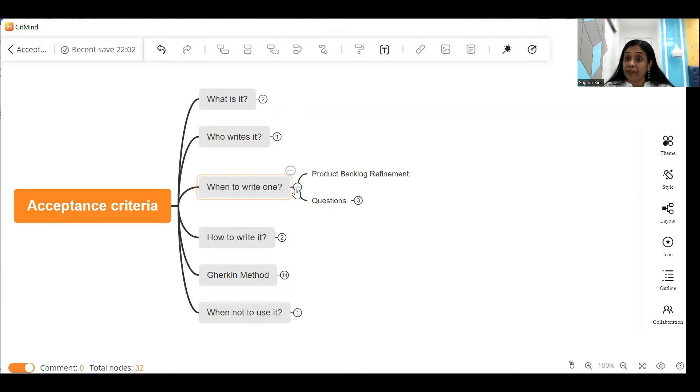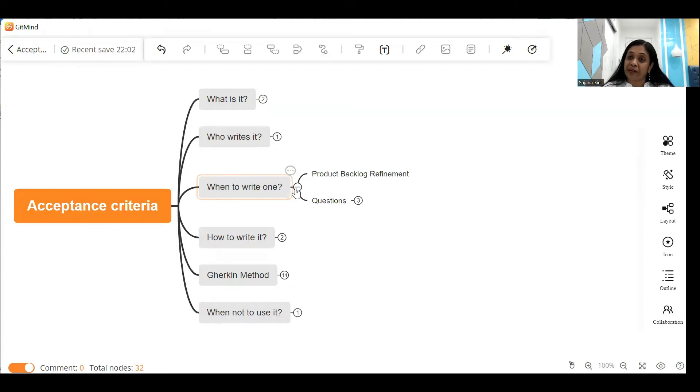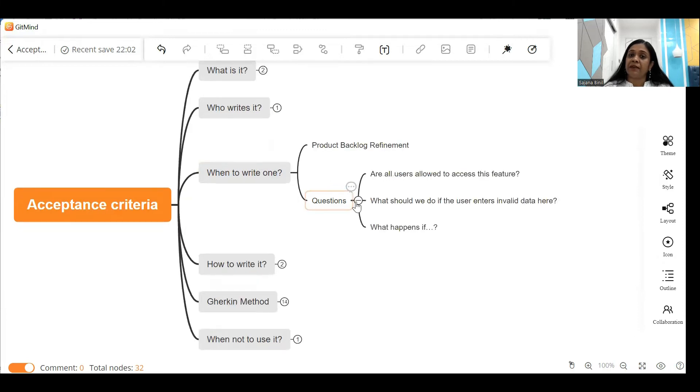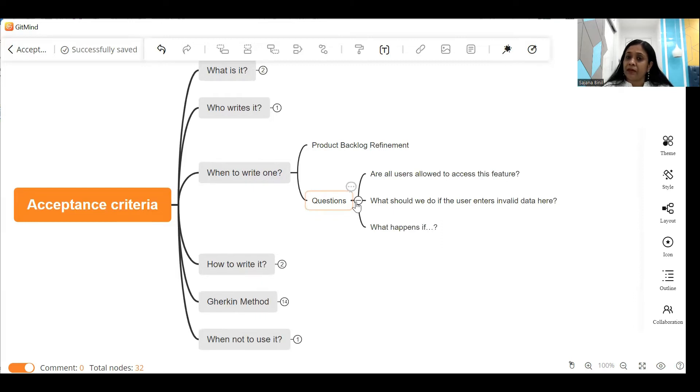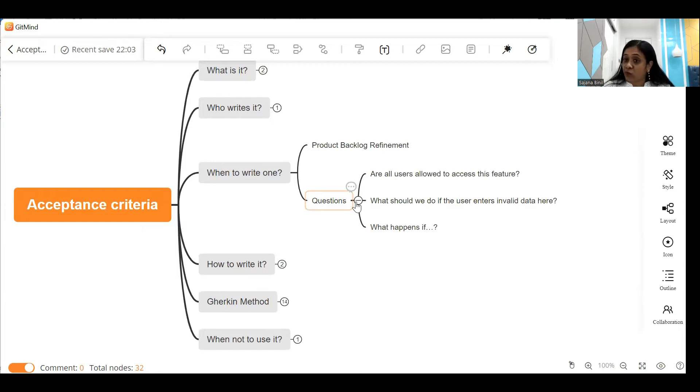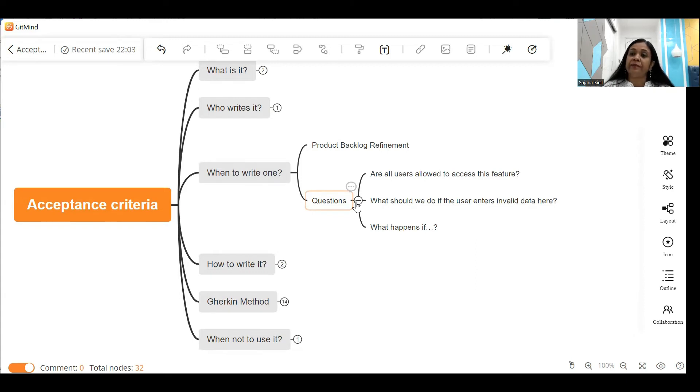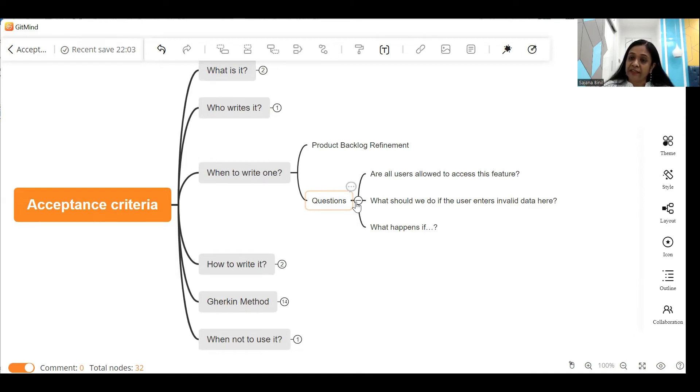Third point: when to write one? Well, acceptance criterias are written just after the product backlog refinement meeting. So during the product backlog refinement meeting the team as well as the business analyst might ask several questions to the product owner, like for example: are all users allowed to access this feature? What should we do if the users enter invalid data? What happens if so and so condition occurs? So in a backlog refinement meeting the product owner clarifies the list of backlog items which are going to come in the next sprint. The high priority backlog items are discussed in the refinement meeting and in order to further clarify things the team might have asked these sample questions.